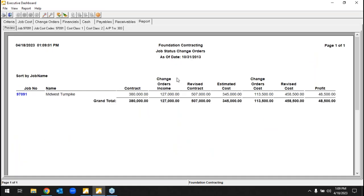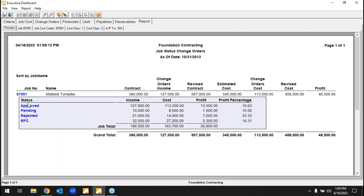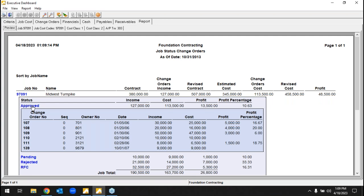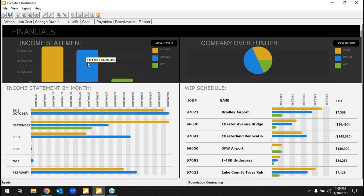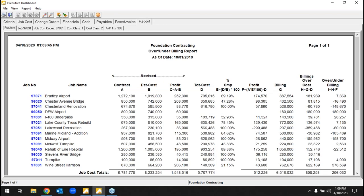For change order management, we can track change orders on a job — the initial contract amount, approved change orders, and the total revised contract. Pending and rejected change orders can still be tracked without moving the financial totals. At the end of the day we're still doing classic accounting: balance sheets, income statements, bank reconciliation, journal entries. We get lots of referrals from construction-specific CPA firms, but the value in our system isn't just the accounting — it's the rest of the construction elements.